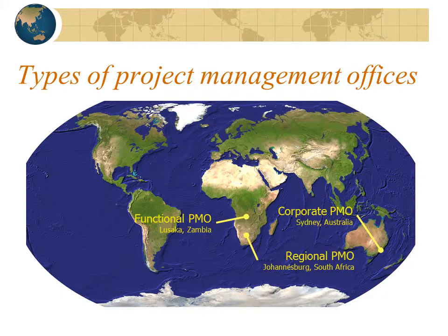A regional PMO combines administration, prioritization, and stage gate decisions for various global projects and programs according to the region. A regional PMO may also be grouped based on the culture or language. A functional PMO centralizes the administration, prioritization, and decisions for projects and programs for one functional area or a division. In this case, it's a country-based PMO.